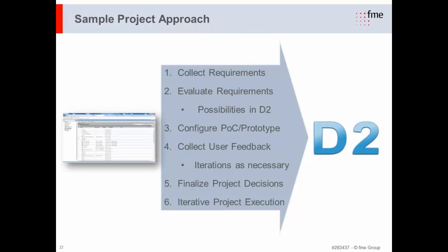Okay, let's talk about a project approach we often use when the customer wants to migrate from Webtop to D2 to deliver a successful project. So first, it's very important to collect the requirements of the Webtop application and to evaluate these requirements against D2: what is possible and what is not possible with D2, because in some cases Webtop and D2 are different. After that, we often configure a prototype or a POC to see if we can implement all these requirements with D2 and present this prototype to the business users to get direct feedback from them on whether the D2 solution is sufficient. This is possible through the configuration, and this is also an advantage because you can create a prototype faster than a Webtop application.